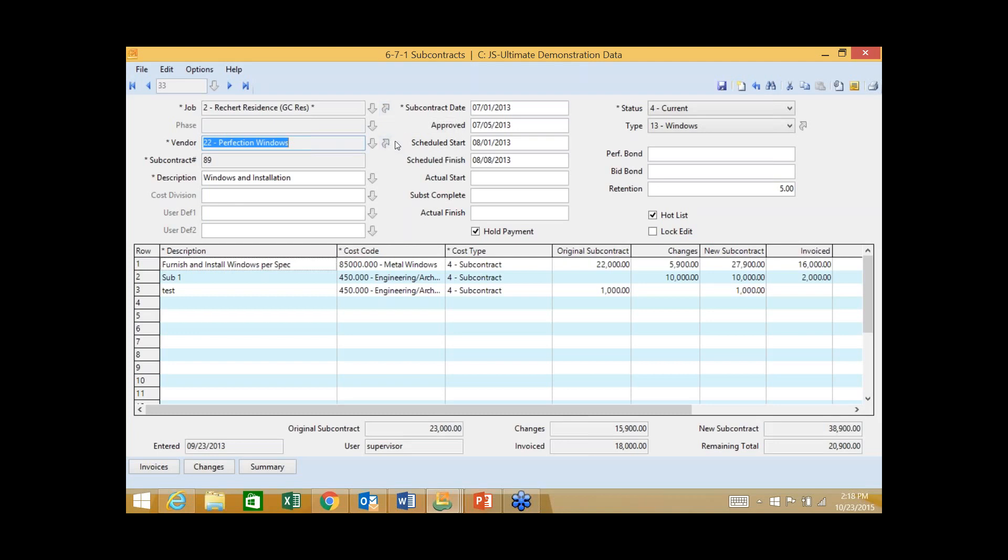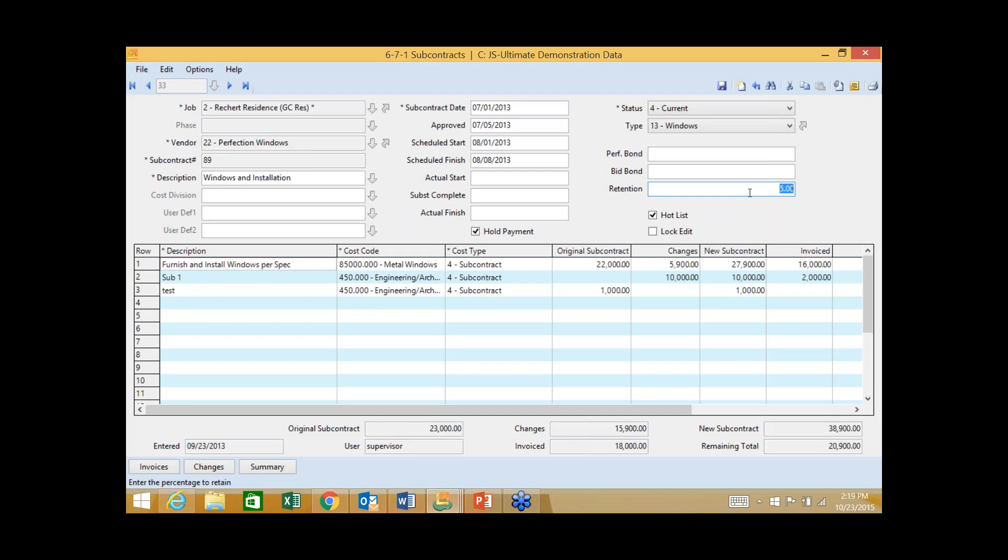For you commercial GCs on the phone, it's also nice to know we can properly manage retainage. When we enter an invoice, it's going to auto-calculate that retainage for us. It's going to withhold it from the invoice for us. And if I needed to produce an aging report, whether it was a receivable aging report for the job or a payable aging report for the sub, it's going to show us an aging report with retainage in its own column, as it should be. We're not going to float retainage along the aging until we release it. Or from a receivable perspective, if our client releases it, then it will float.